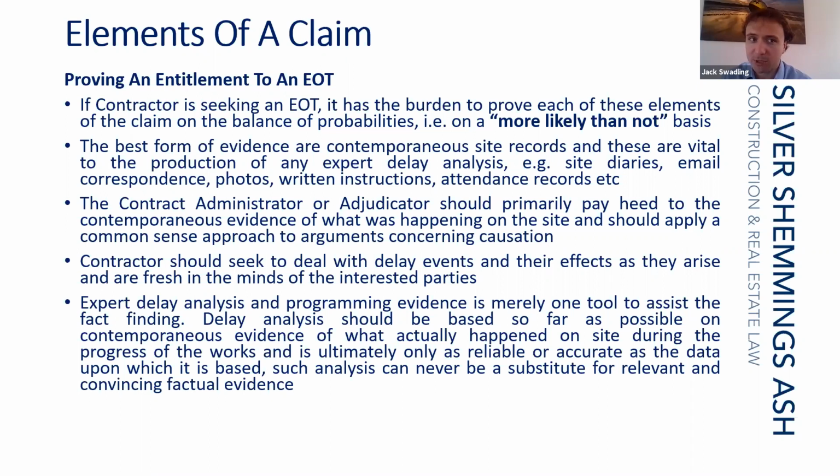So there's not much point getting hung up about different delay analysis techniques if there aren't good site records to demonstrate the underlying facts and the cause and effect, which is fundamental to any claim for an entitlement to an extension of time.